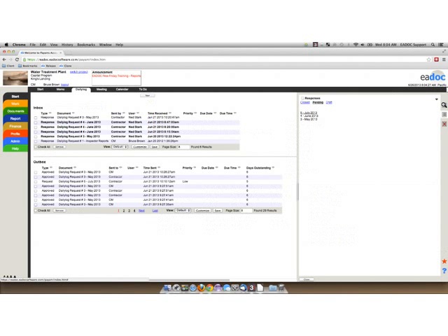The request portion of the document is something that you only want to fill out maybe once a project, maybe once a month, maybe once per inspector, but it's not something that you should be filling out every day and sending over to your inspector. What you want to do is group all those daily logs in a way that makes sense to you. I selected months because only one inspector is going to be responsible for it. Whether it's Joe this time and Ned next time, it doesn't matter. They only need to submit one report to me each day. If I had several different inspectors, then I may want to separate them out by inspector. So John sends his over every day, and then Stan also sends his over every day.